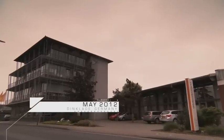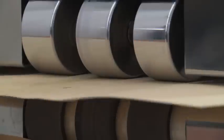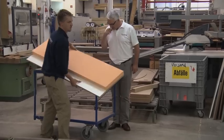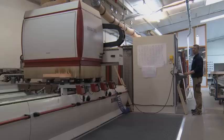In Germany, work continues on the Inuit's interior. Weight has to be kept to a minimum, but the immaculate finish requires 150 square meters of veneer. The big challenge in this project is to have a super lightweight interior according to the highest possible yacht interior standard. During the design phase, 5 people are assigned to the project. Once the materials have been sourced and production begins, this rises to 20 people. Work then lasts for 2 years.